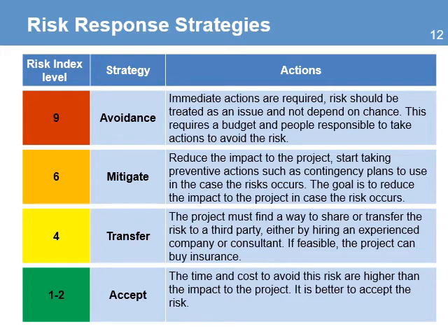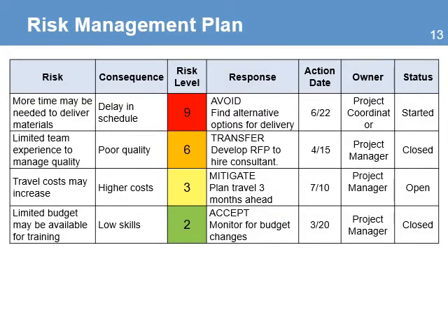The last one is to accept the risk. The level of impact and the probability of the risk are low, so even if that happens, the costs or delays to the project are minimal and less expensive than implementing a response. The project manager will monitor this risk to see if there are any changes during the life of the project.